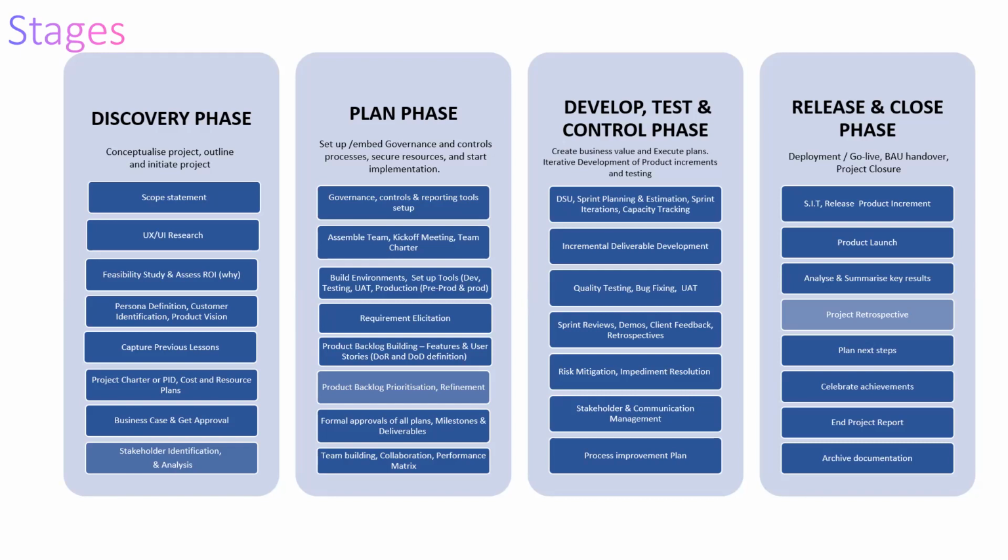Because it seems the third phase, that's where we said develop, test, and control phase. We cannot have control phase on the third phase when we're developing. Anything that has to do with control, even if you are going to work in a waterfall, you must have put your control process in place before you get into the development phase. Because your control becomes an auto run. When we say control, you remember the controlling tools that I taught you. What are the controlling tools that we have, guys? What are our controlling tools? Be yourself. Talk to me.